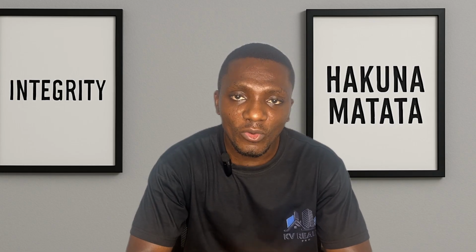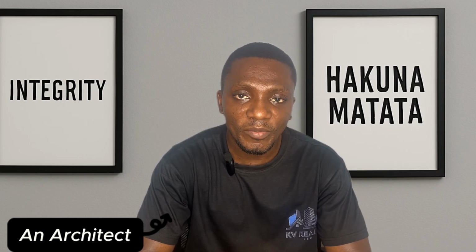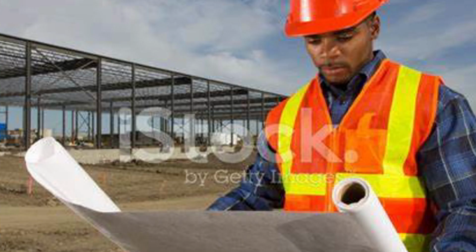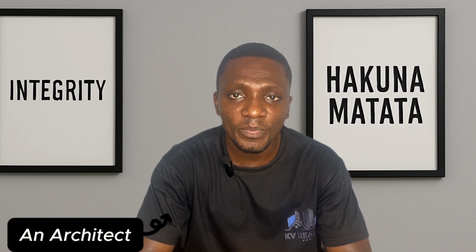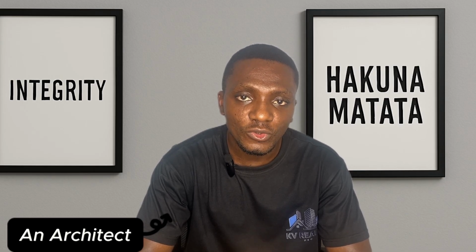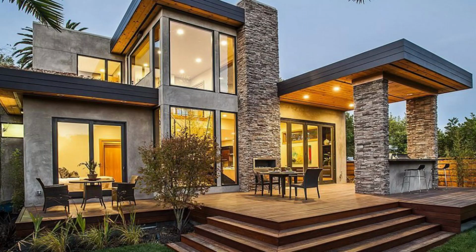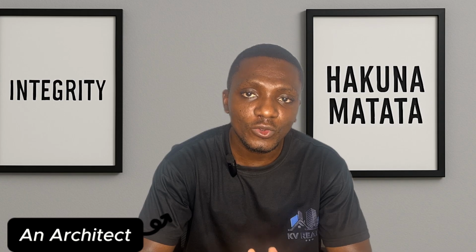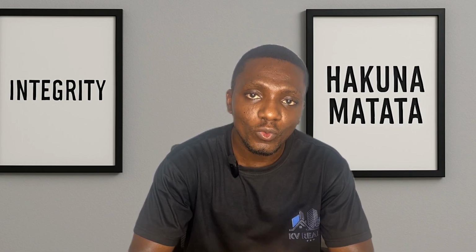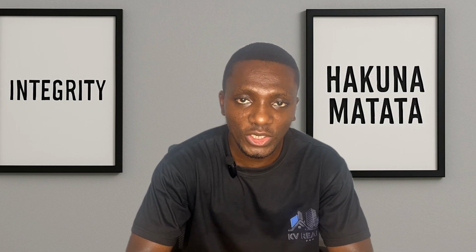So when you want to develop or redevelop your property, the first professional you should contact is an architect. The architect, from the beginning, would want to visit the site. In some cases, the architect will request a land surveyor's report to understand the features and topography of the land. The architect will then collaborate with you, the client, to prepare a building design which meets the client's tastes and preferences. It should be aesthetically pleasing, but it should also be functional and efficient. The building design should also meet the National Building Code and the necessary planning regulations, which is essential to secure a building permit for construction.